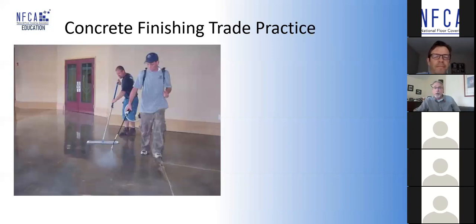The general contractor would coordinate that work. They would go out and obtain prices. Whoever can do this is free. If a Division 9 guy wants to do the work, fine, but it will be specified in Division 3 concrete.